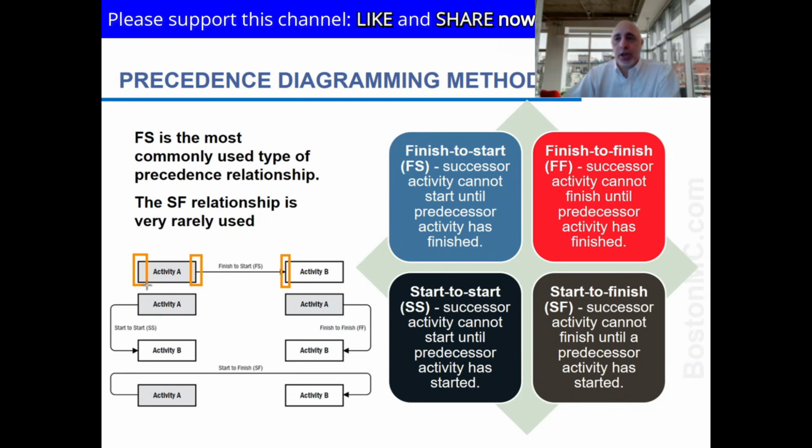It's the way we write in English, left to right, okay? This is the beginning, this is the end of the activity. So this is the end. This has to end before this one can start. All right, so this is finish to start. If I connect any two activities on my schedule, it will always show finish to start.